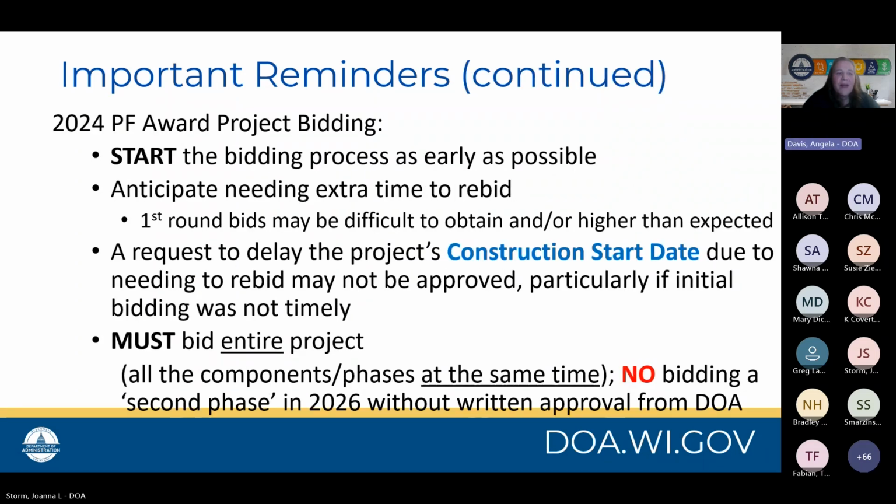Also, some important reminders, you're getting ready to do bidding. This will be talked about a little bit later, but I just want to emphasize that starting bidding early is really important to meet the construction start and end deadlines. So don't wait until March or April to do your bidding. You should be doing that immediately as soon as feasible to ensure that you're able to start construction on time,